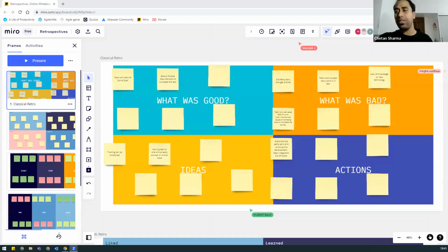So normally what I do is, in case they give a particular date and it comes on that date, no issues, we go ahead. But if there is a delay of more than 2 to 3 days, and it is practical to take that story on that day and finish it, then only we take it. Otherwise, I just reprioritize the story, take another story, and move this one to be on the safer side.